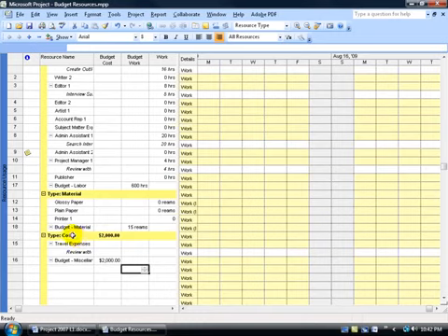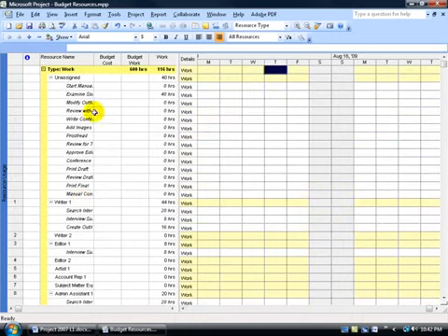Remember, I have cost, material, and work. What about the fourth one, budget? Well, because I have a column field for it, it puts it right there. So first of all, work. It groups all the work resources together and gives us the total of that group, which is 116 hours. All I have to do is look over here and say we got 600 hours budgeted. We're coming within budget. Fantastic.